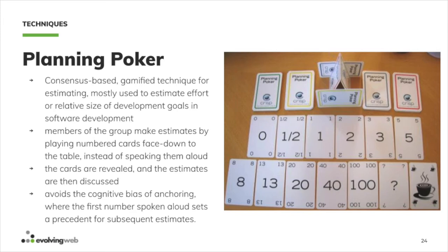It's another estimation technique called planning poker. And so basically, let's say you have a project that you want to estimate. You have a series of user stories in your backlog. And then you'll have a team of estimators, and hopefully one representing each department. So let's say one representing UX, design, development, project management, QA. Each one of them will get a stack of cards with these different types of numbers. And then what you're going to do is the product owner is going to read a user story to you and describe to you all the requirements and the business requirements.